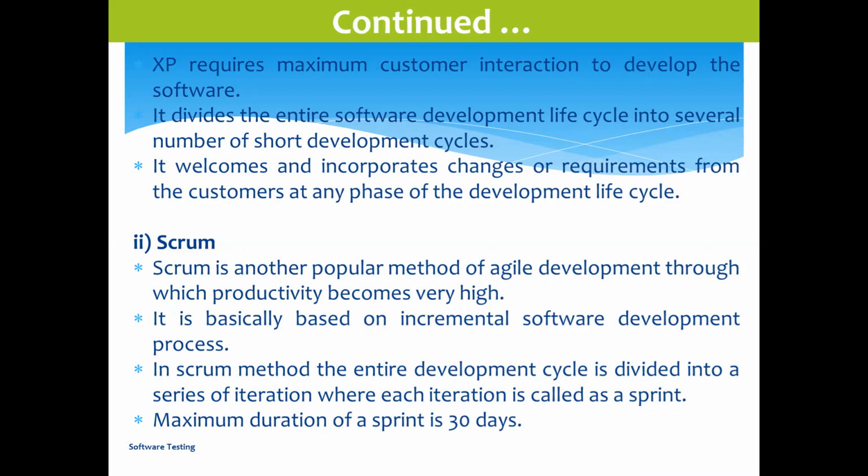Our second sprint is there, our third sprint will start on which date, next Monday, like that you can say. So one sprint has 14 days minimum and 30 days maximum. Some projects use 28 days, meaning 4 weeks, some use 3 weeks, and some use 2 weeks.